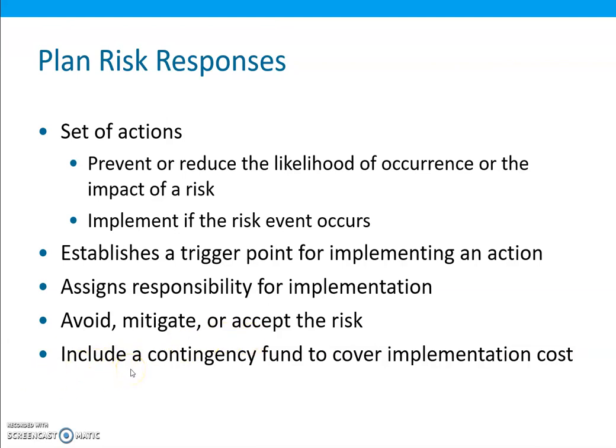A risk response plan should include a trigger point or warning flag for when to implement the action plan for each risk. A trigger point for when to purchase a rare material may be if the current price increases more than 5% above the amount budgeted for purchasing the material. The trigger point for deciding to incorporate advanced technology in a new product may be the completion of an engineering feasibility study. Another example would be to authorize overtime if the project falls behind schedule by more than 5% of the remaining project duration.